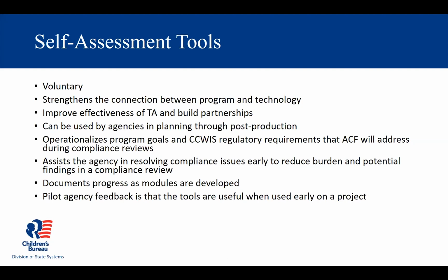Early feedback from several pilot states that have used these tools is very positive. One of the key things I've learned from their feedback is that they wish they had done these early in the process, even in the planning stages. So we have been sharing that when talking to other states: there's no reason these have to be done after design or production. They can be done even in planning, and frankly, at any phase of the project as a way to take a status check of where you are in your process.